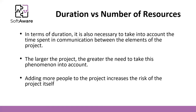Regarding number of resources and effort: if you put more resources — more persons — on a task, you can reduce the calendar time. For construction projects this correlation is simpler, but for software it is different. Adding a new person to a software project increases risk and entropy. In the medium term there may be productivity gains, but immediately you must spend time on knowledge transfer. Speeding up a project by adding people is always a risk — before gaining productivity, you will first lose it.